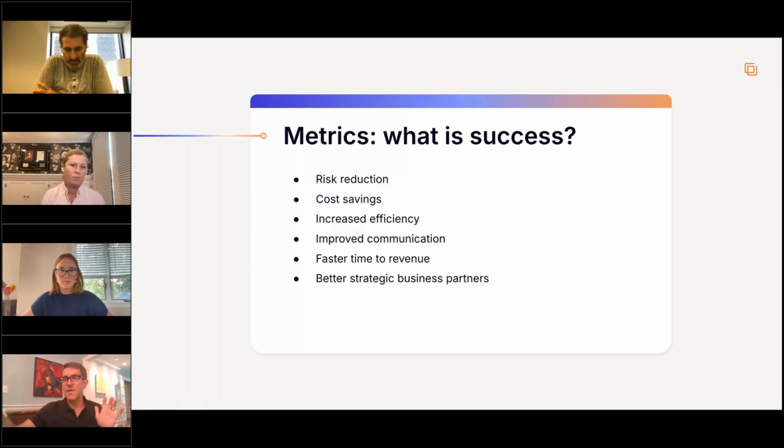And then we said, okay, we're going to look at this 1 quarter after implementation, 2 quarters after implementation, and see the progress that we've made. So we already knew going into implementation what we would want to measure 1 quarter out, 2 quarters out, et cetera. And then the key thing is knowing how you're going to get the data. Because if you have to try to estimate these metrics or base them on kind of gut feel, they don't work. They really work when you're pulling hard data, either from the CLM itself or maybe from your Salesforce system or other systems of record that are part of the process.